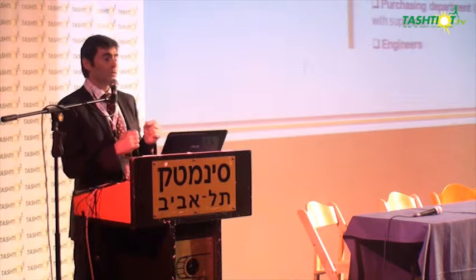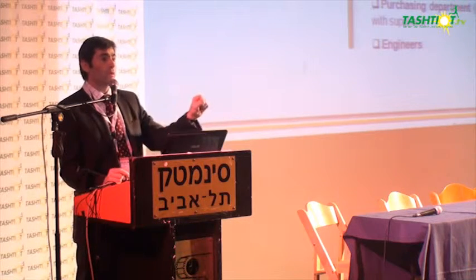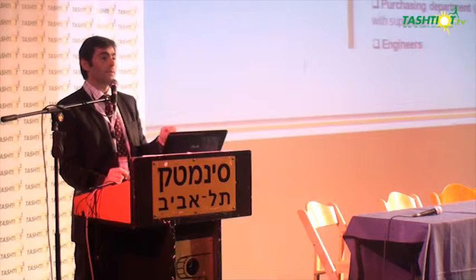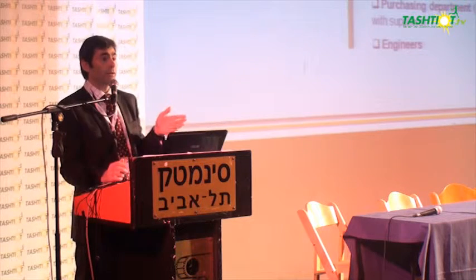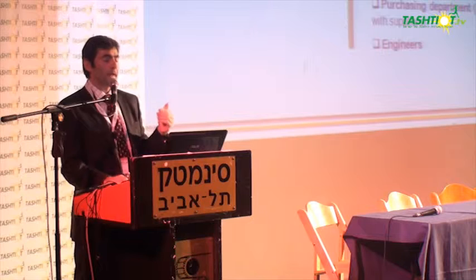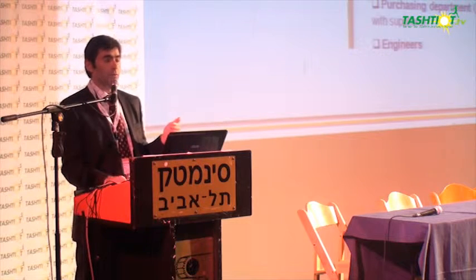And also you have to find out that when you have to go 3 kilometers, maybe you have to go through a lot of people's plots, so you have to deal with them, or maybe you have to go through a river, or maybe you have to go to a place where it's really complicated to go through, so you have to plan ahead of time for the mid tension or high tension.